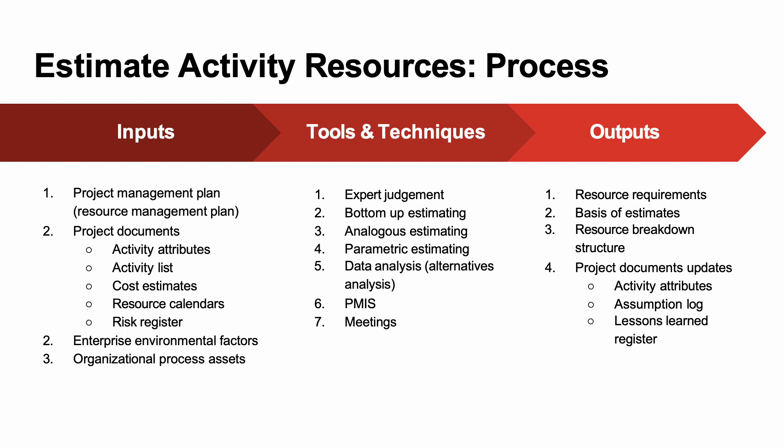Because it's all about activities, the main inputs are things like our activity list from the WBS, cost estimates — which were derived based on understanding of material, equipment, and resource requirements — when resources are needed, and associated risks. The tools for estimating activity resources are the same as for estimating activity durations and costs: expert judgment, bottom-up estimating, analogous estimating, parametric estimating, and so on. The outputs are resource requirements and the basis of estimates.